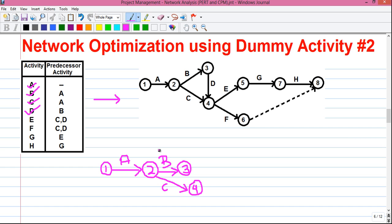Next activity D has the predecessor activity of B. It will end at five. Next activity E has the predecessor activities of C and D. That means both activity C and D must be completed before activity E can start. So activity C ends at event four and activity D ends at event five. So we have to join the two events using dummy activity. Dummy activities are represented using dotted arrow lines. So both the activities ended at event five, and from here we can draw activity E.